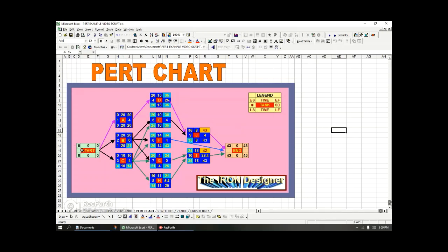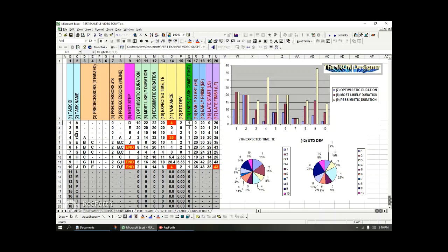So in the Pert chart, we have a starting point, and all the early start, late start, everything is at 0, okay? And I basically created these 9 cells here because they contain all the information we need. So you go to the legend here: you have early start, early finish, you have the duration, that's just in the middle. This is the name of our task, ABC, then the late start and the late finish.